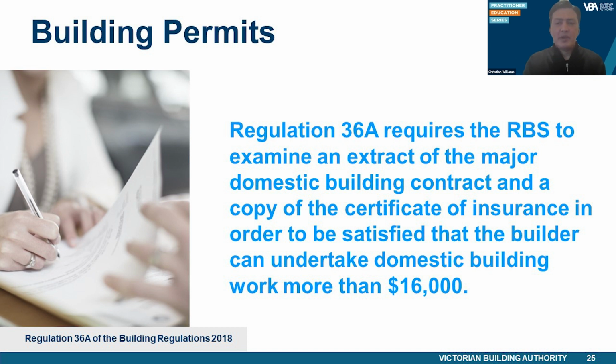This work is considered to be commercial building work, which is work on Class 3, 5 to 9 buildings and associated Class 10 buildings. It is noted that the type of practitioner that can carry out this type of work is not specifically mentioned. Therefore, in these cases, it would be at the discretion of the relevant building surveyor as to whether the practitioner has the appropriate knowledge and experience to undertake the work.